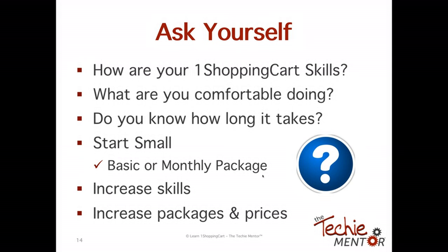So you need to know how long it takes whoever's doing the work. When you ask somebody, well, how long is it going to take me? As a project manager, I'm not going to tell you that because I don't know how long it takes you. You have to figure that out for yourself, okay? So that's one of the things I recommend as well. As you go through this course, you should have a task management system. If you don't, I hope you get one before the end of this course, but you could time yourself to see how long it takes you to add a product or send out a broadcast or any of that kind of stuff, right? And then you'll have an idea of how long it takes you. Obviously, the more you do it, the better you get, but you need a rough estimate.